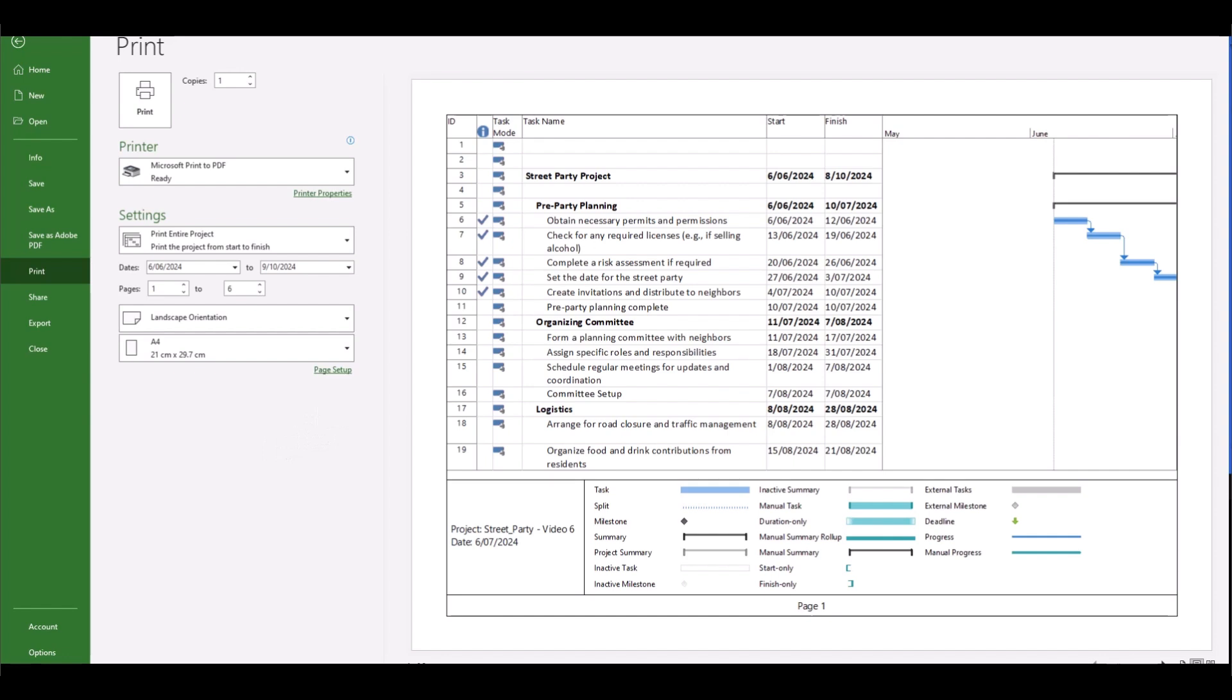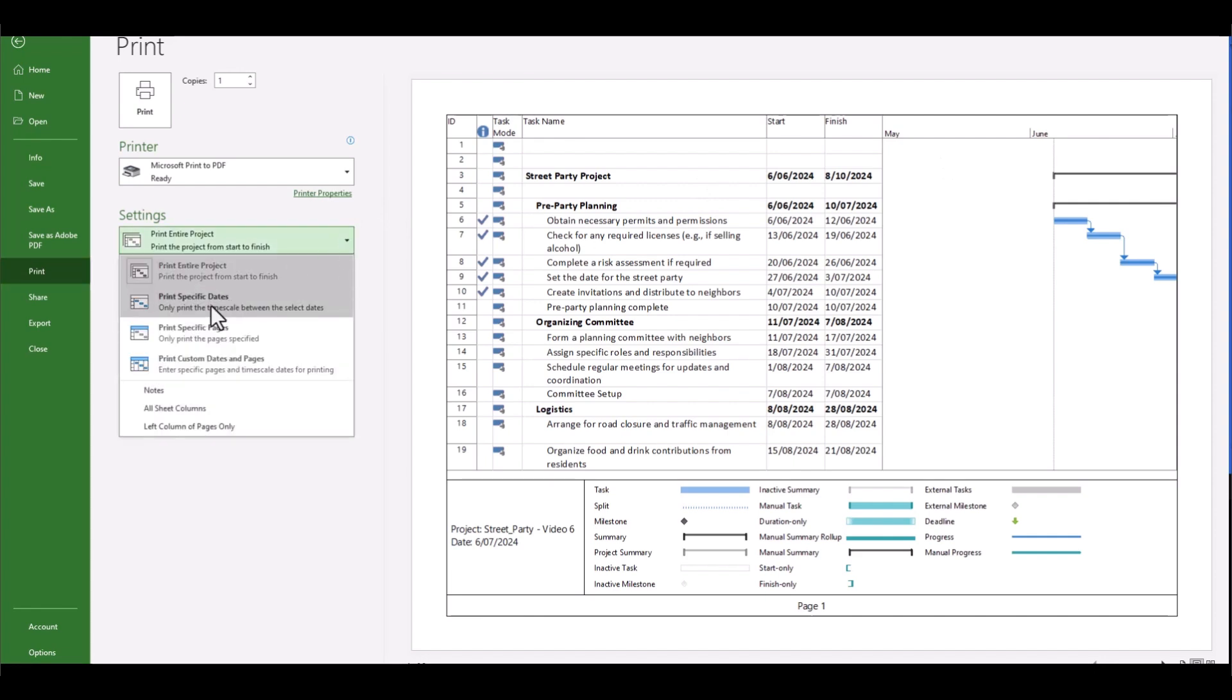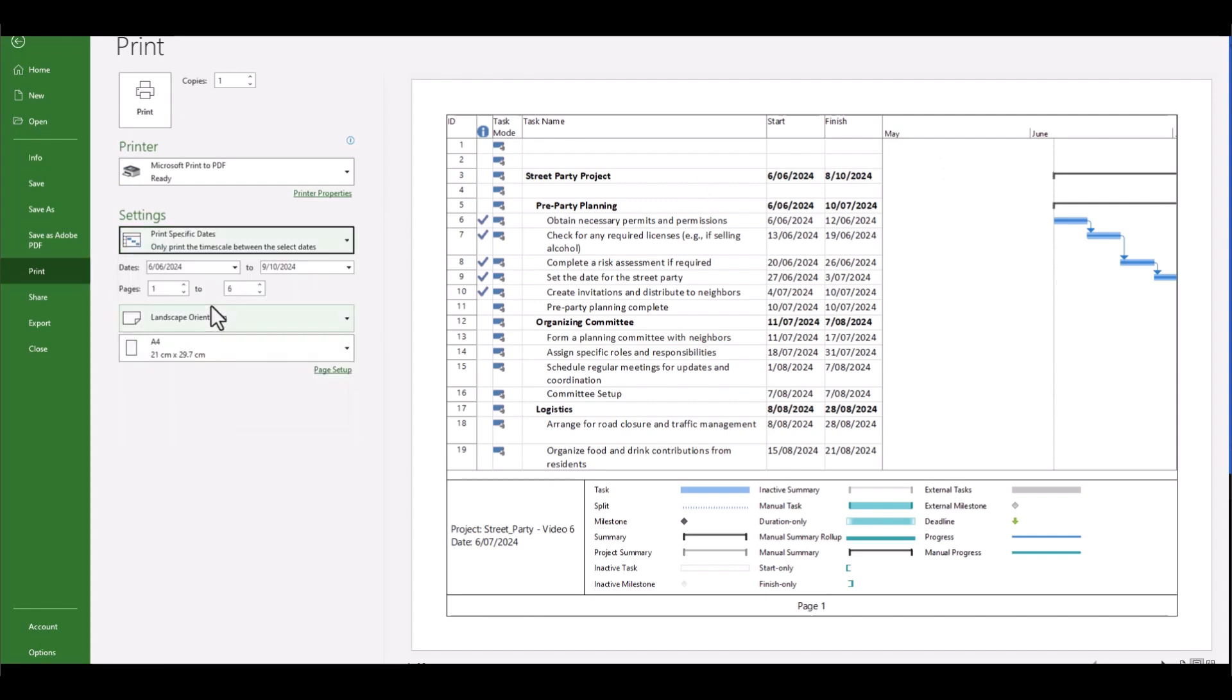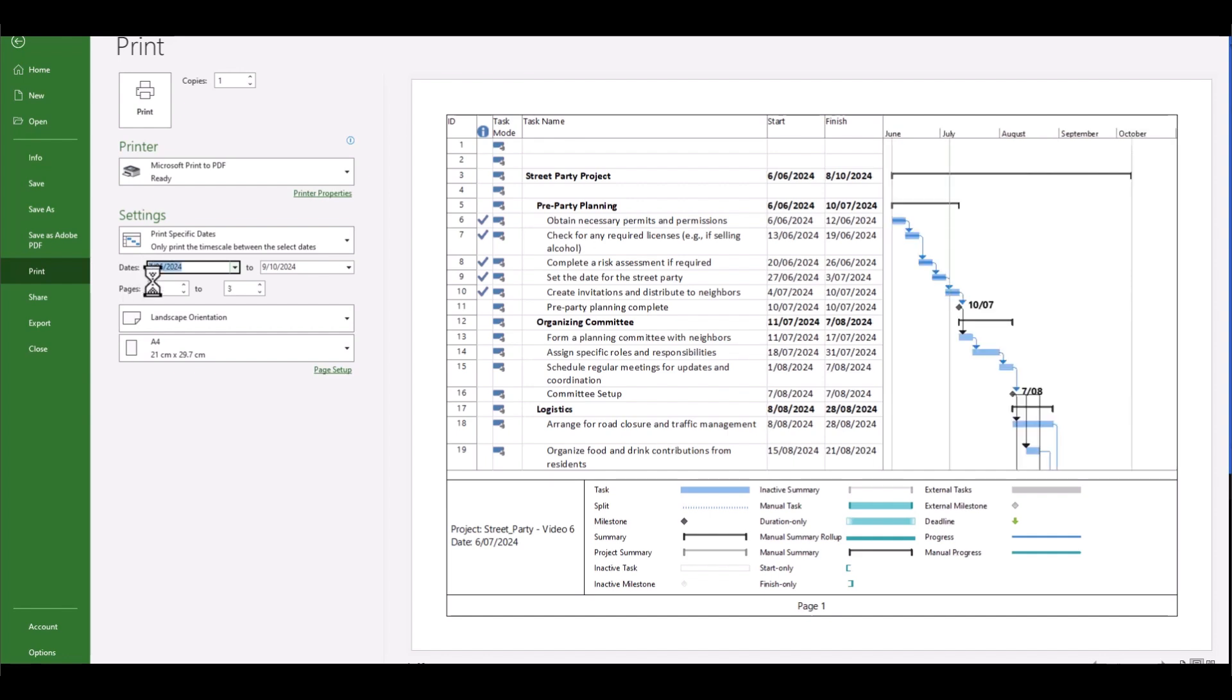So what further options can we do to try and minimize the amount of pages that are required for this project? Well, let's have a look at our settings. Instead of print entire project, let's select print specific dates. And even though our first date is on the 6th of June here, let's just use trial and error and start from the 7th and see what that does. Notice that shifts it along a little further. So less wasted space and we're moving in the right direction.